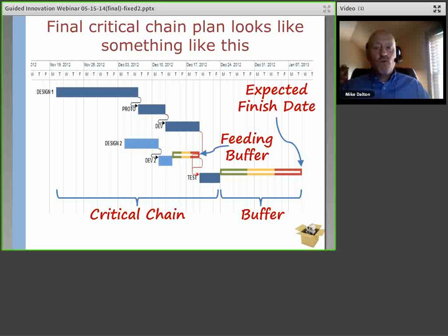And what that allows us to do is reduce the planned duration of the project by 25%. And you might look at 25% and say, well, that's not half. That doesn't sound that great. But the actual effect is much larger because we greatly reduce the probability of schedule overruns to less than 10%. Versus today, where there's probably more like an 80% chance of overrun.